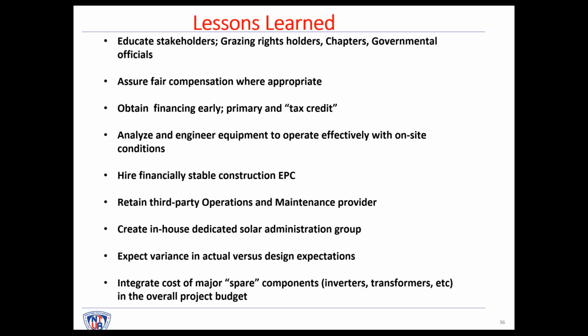Retain a third-party operations and maintenance provider. That's important because most tribal entities don't have the in-house expertise to operate and maintain large-scale solar projects such as these. And that's exactly what we've done. Create an in-house dedicated solar administration group. At the same time, while the expertise isn't initially there, create that type of expertise so that you have it and it continues to grow over time.